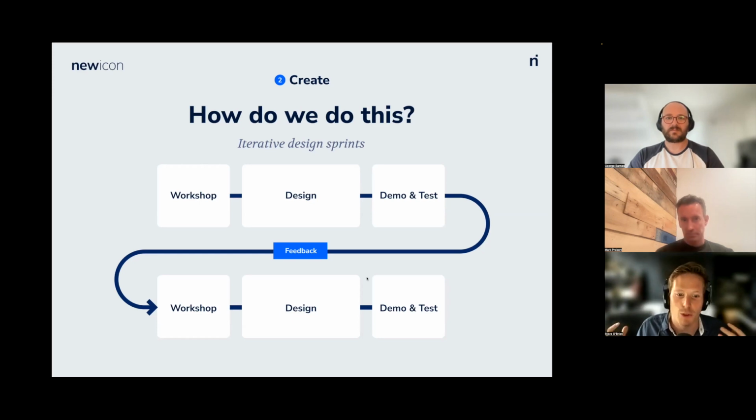And then it's quite important to make sure certainly C-suite people or directors and decision makers all have experienced that prototype early, so everyone goes, oh yes, that is definitely what we're building. Because it's very easy with vague definitions and top level things for everyone to have slightly different understanding. And then towards the end of the project, when they finally give it to the CEO or the decision maker, they say, I thought we were building this. It really helps avoid those and basically align everyone in the team and all of the stakeholders in what we're actually gunning for and what we're trying to create.